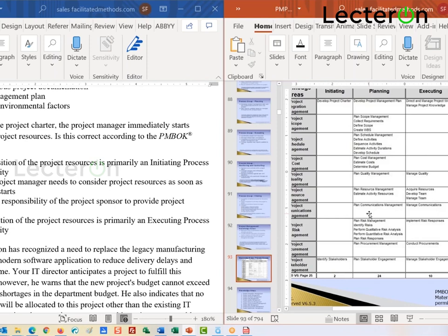Now, let me confuse things a little bit. If I'm in an agile type of project, we don't do it the same way. If I'm doing an agile project, I form my team and then the team does the planning, not just a few people. It's a little different, but according to the PMBOK Guide, you wait until at least some planning has been done before you start to acquire the actual team members.